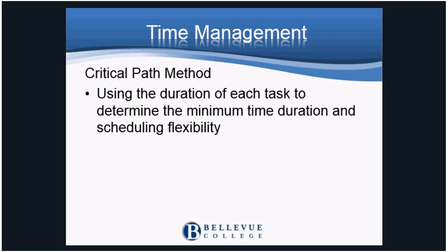The critical path method uses a duration of the task to define the flow. From this flow, the minimum time to complete the project is based on available resources. This method also locates the sources of flexibility in the schedule. The program evaluation and review technique uses probabilistic estimates, and the overall times and the areas of flexibility have more variation. Both methods set the order of the tasks, making modifications to the precedence diagramming method.